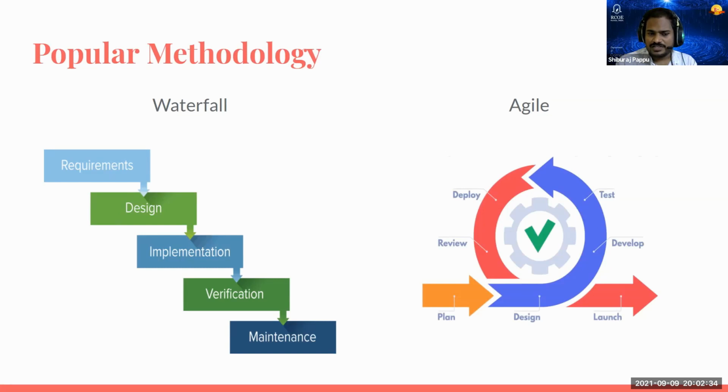So now what happens is he may be happy, he may not be happy, it depends, right? Now what happens over here is, first you don't know exactly how much time it will take to complete the project, right? Because you are completing the entire project in one go. Second, the customer is not involved anywhere except for the first and the last stage.